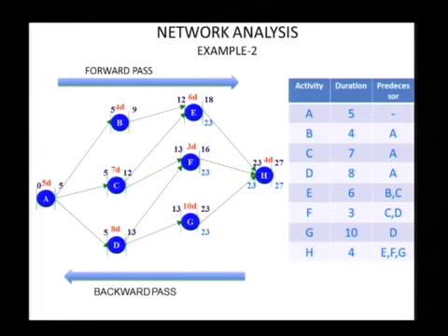Okay, so when I am calculating the backward pass, we first calculate the late finish, then go to the late start. So I have 17, 20, 13. Now I come to B, late finish, 17. C has 2, it has 17 and 20 as successors, 17. Okay, D has 20 and 13, 13. Now further back to the late starts, 13, 10, 5, and A now has 13, 10, 5 as successors, 5, 0.